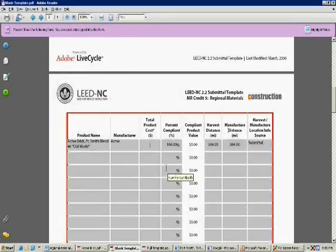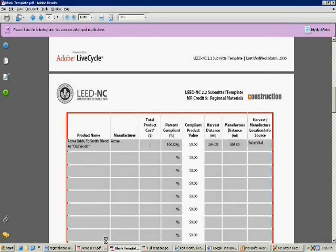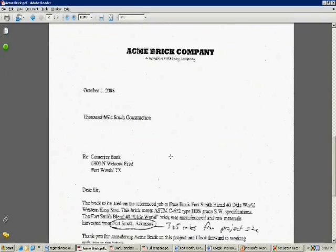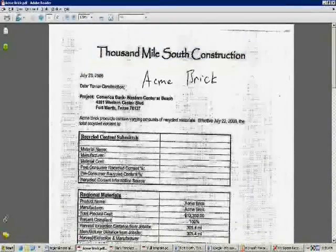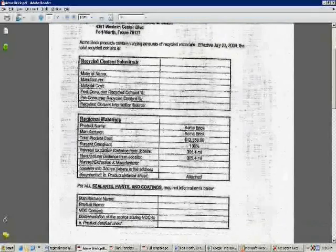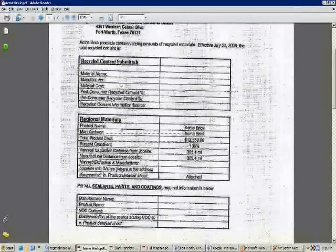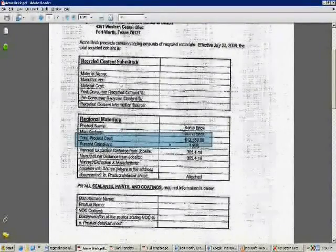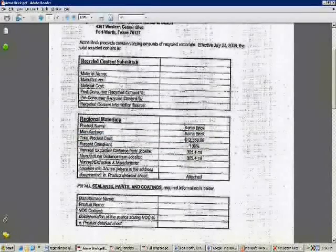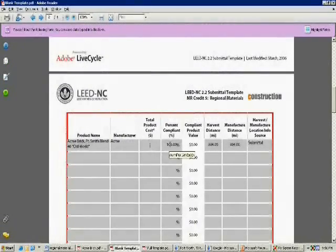As you can see here, I still need to fill out the total product cost. For this, I got documentation from my masonry subcontractor and I asked him how much the brick material cost. He told me that the brick material cost $12,350. Now I go back to my template, type in $12,350, and my submittal template is complete for that one line of material.